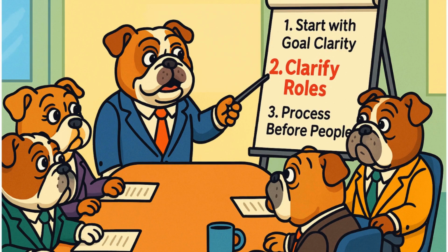Number 2 is you clarify your roles next. Once goals are clear, use a simple RACI matrix. RACI is a responsibility assignment matrix that we use with teams. You're welcome to Google it. There's a lot of good information on it. It's really, really helpful. The idea is to establish and be clear on who is responsible, who is accountable, who is consulted, and who is informed for this particular project and this particular team. Once goals are clear, use something like a RACI exercise, and you really don't have to take more than 15 minutes to eliminate overlapping responsibilities and authority gaps that create friction disguised as personality conflicts.